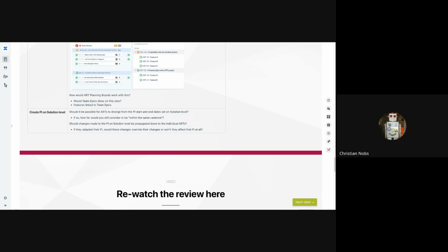This is Christian again from Julius there. I think for us, we have multiple arts, and we're struggling that every art starts exactly on the same 1 or 2 days. So for us, I think the tolerance would be a week. I would say a week to maximum maybe 10 days, so that we have some allowance to the logistics of all the PI plannings. Sure. But I think to have a top-down aspiration to have the same naming conventions and the same start and end dates, I think that is very valuable.